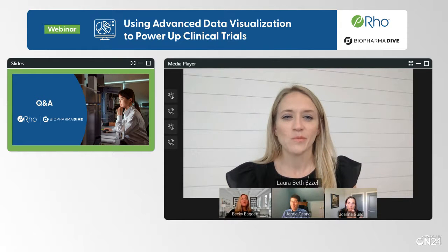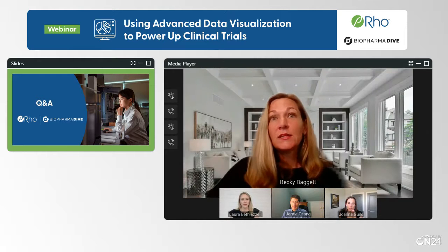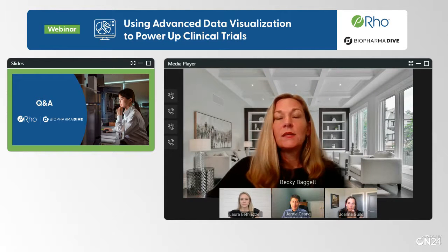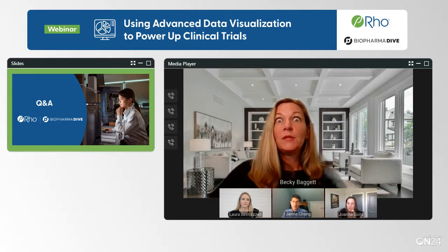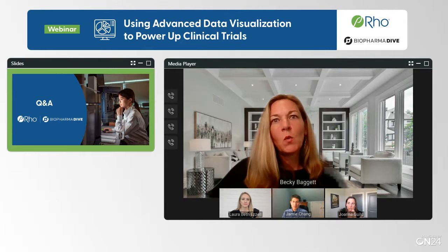I can take that one as well. Thanks. Yeah, that is a great question. Honestly, it really depends on the study. If you have a study that is planned to be slow rolling, maybe 0.2 subjects per site per month, daily review probably doesn't make a whole lot of sense. Maybe in some cases, even weekly review may not make a whole lot of sense.